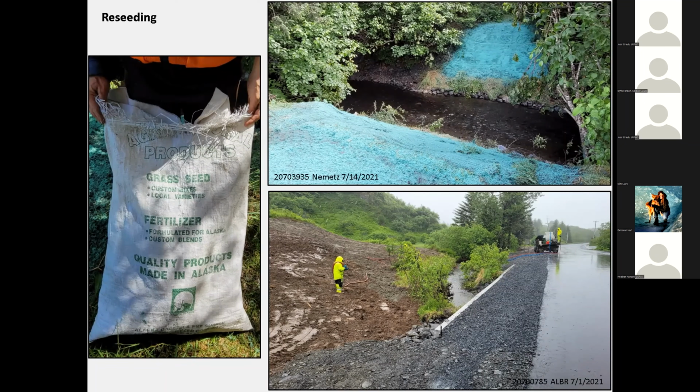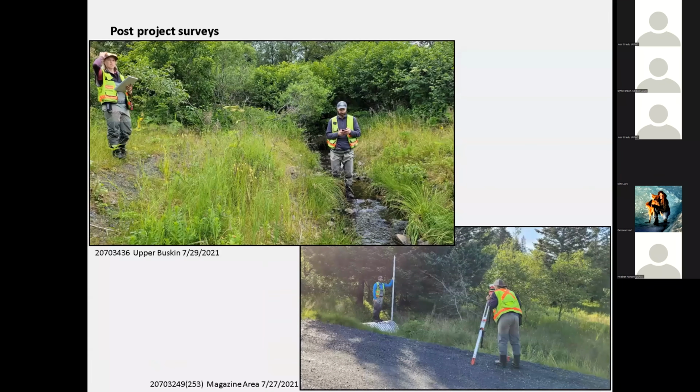So you required equipment cleaning and the use of weed-free products. You checked the veg mat source and seed label. You have enforced the specs to the best of your team's abilities. Construction is completed. What next? Post-project surveys. Not only do you need to know that the structure or new channel is performing as designed, but you want to know that your project has not contributed a new problem to the area.